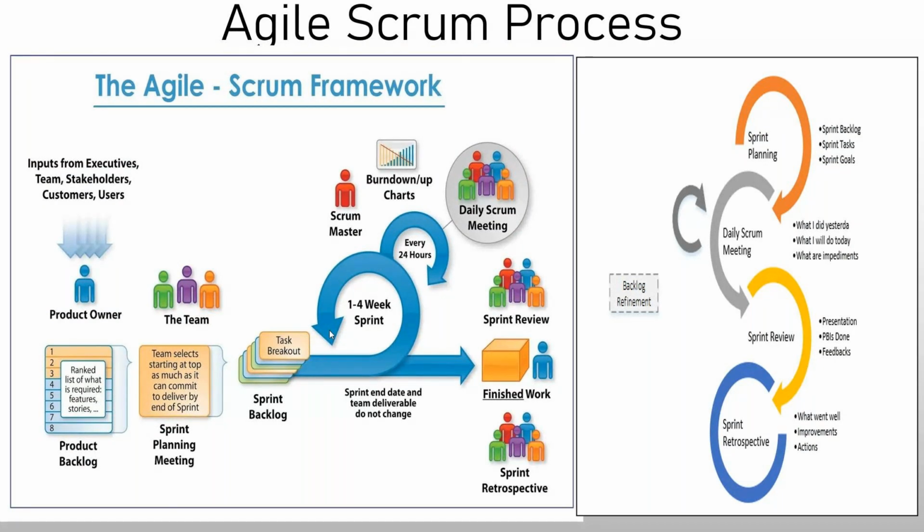But once you are following agile, since you are going to work in sprints, you have to break down that requirement into small user stories, and you use those user stories to pick up in the upcoming sprint. So in our example, we have a lot of screens. We have a new customer creation screen, token issue system screen, a search screen, and many other aspects. You're going to break those down into user stories.